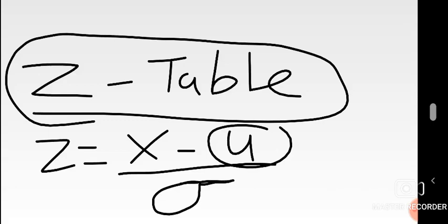So standard deviation, you might wonder, okay, but we only have the mean column and the variance column. How do we get standard deviation? Standard deviation simply means taking the square root of the variance. So that would be very simple. You already have the total for variance, take the square root of that total and it becomes the standard deviation, and you can easily substitute in this table.